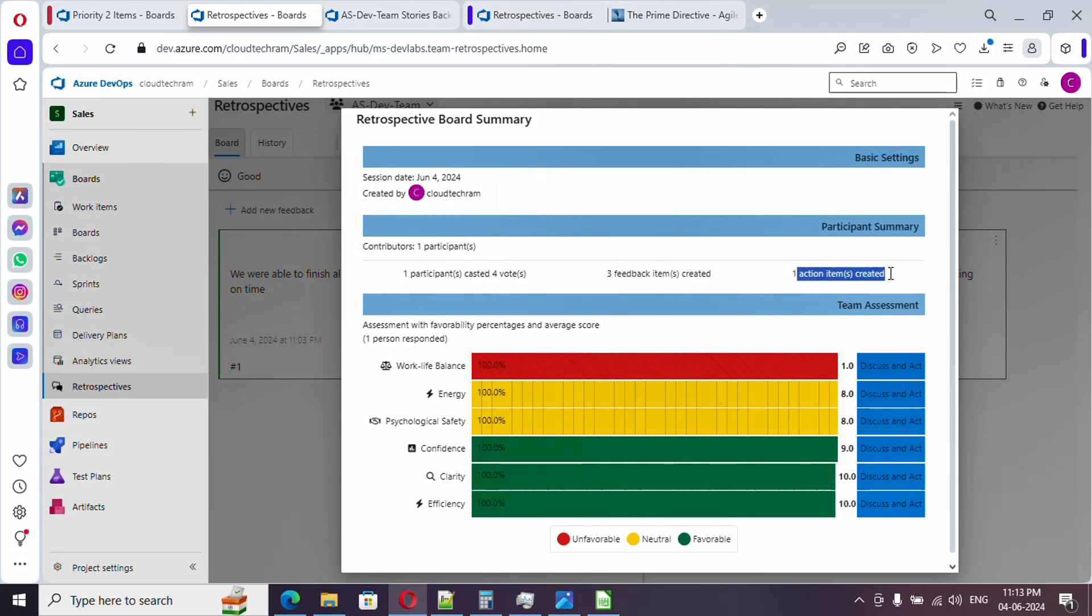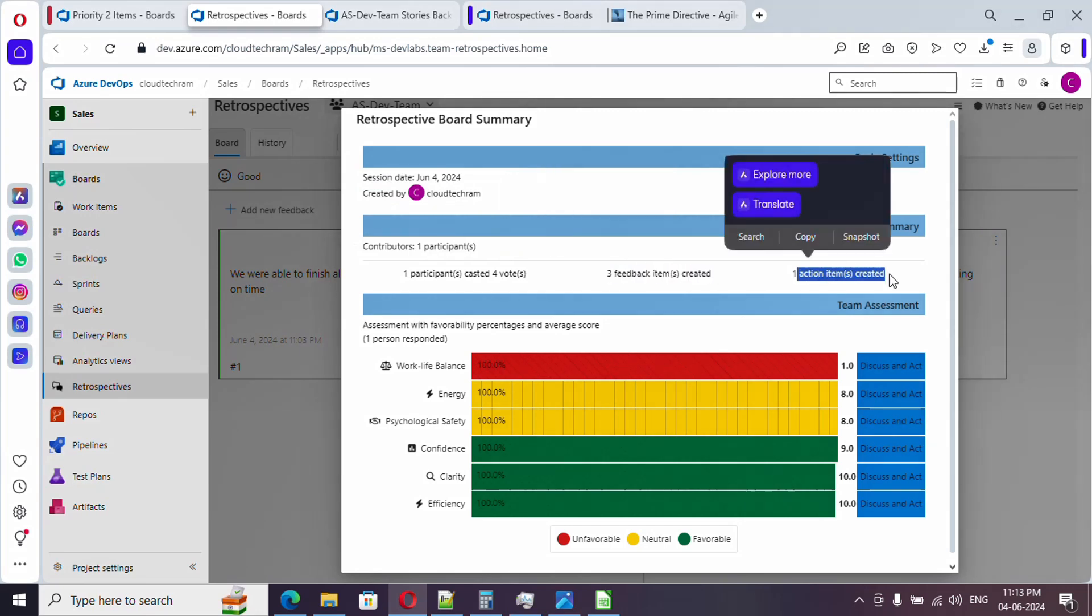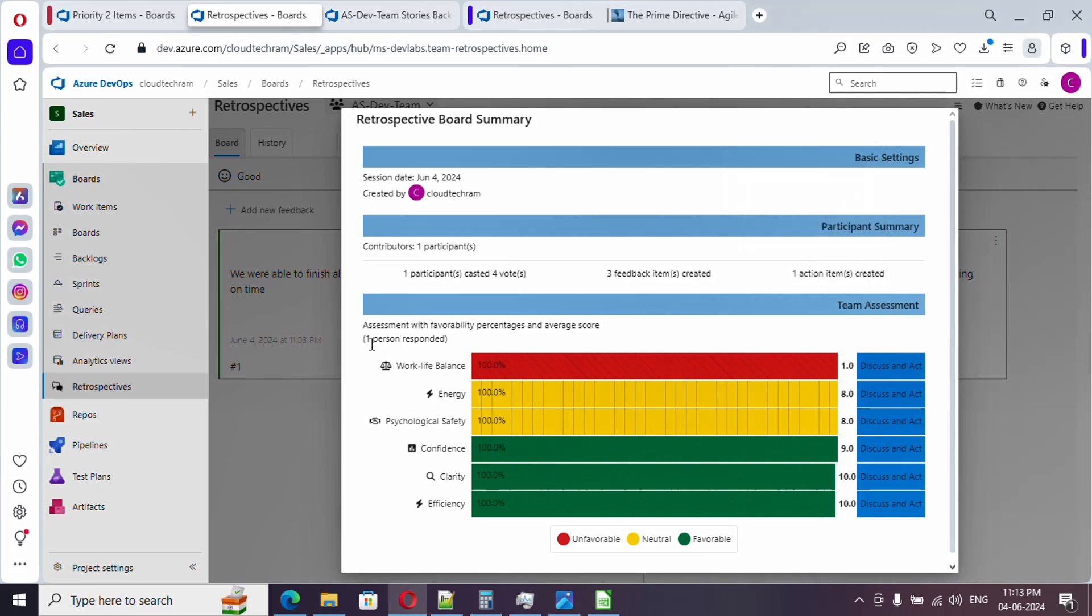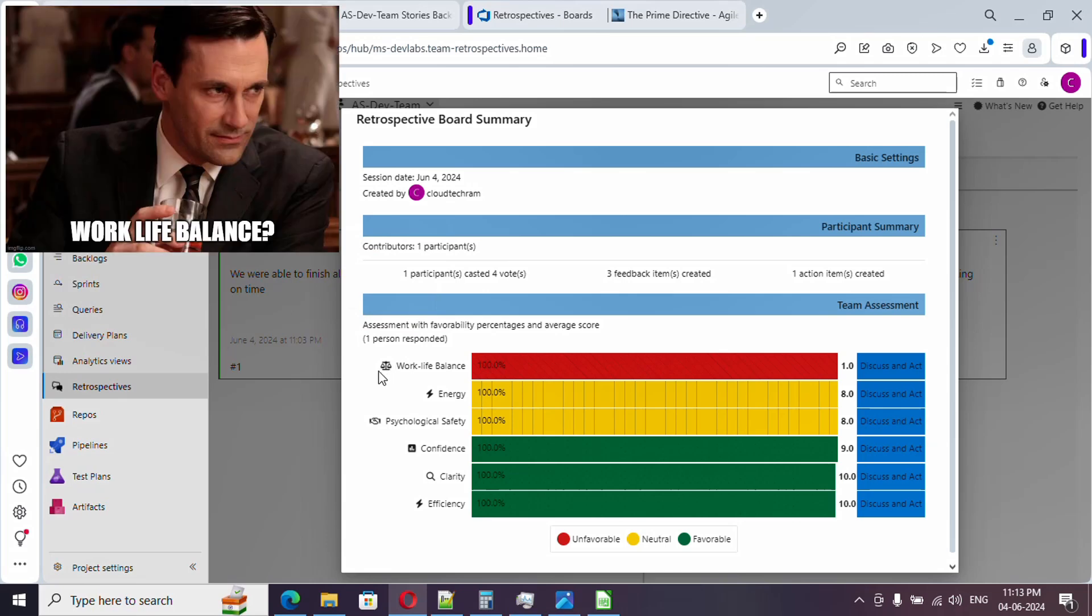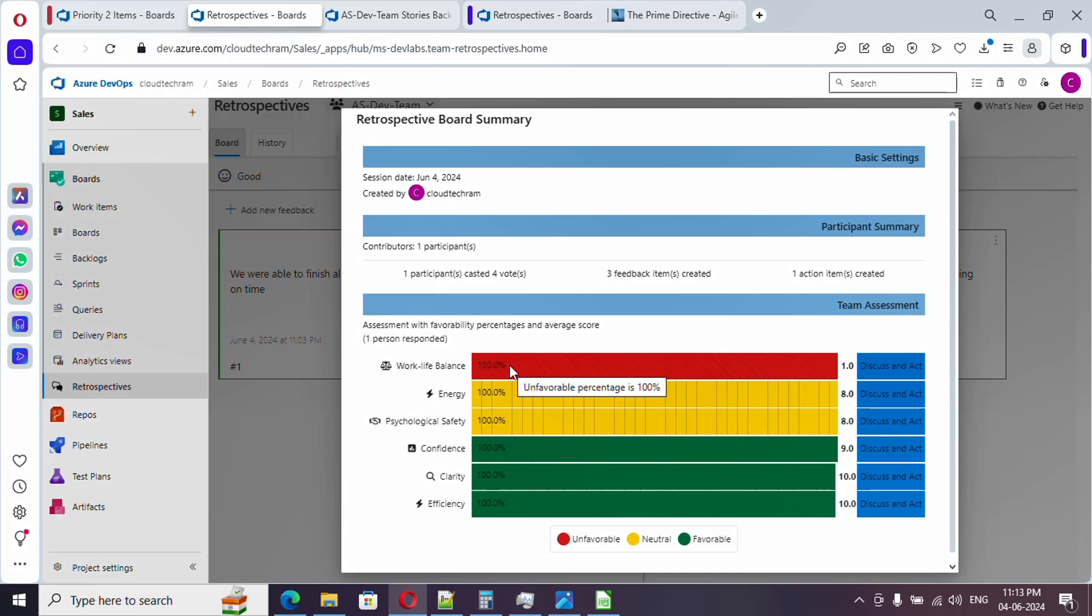Here if you see, only one participant is there and he casted four votes and three feedback items were created and one action, the work item we created. Here if you see how many people have responded to this assessment, it will show up here. Work life balance is poor. In that case, the scrum master need to address this, either he can ask what is the issue over here or he can reach out to every single team member after this meeting to address this particular issue.